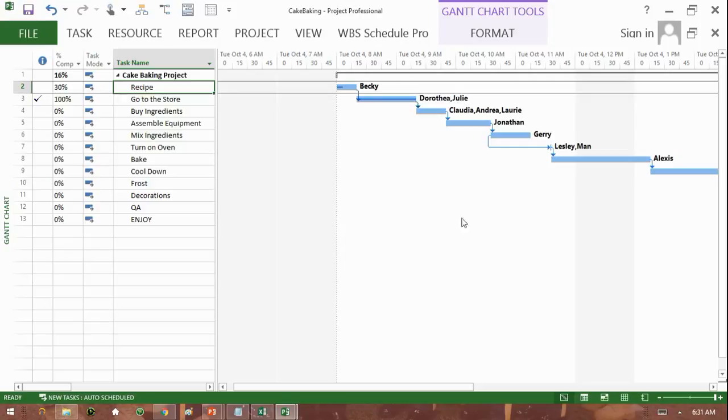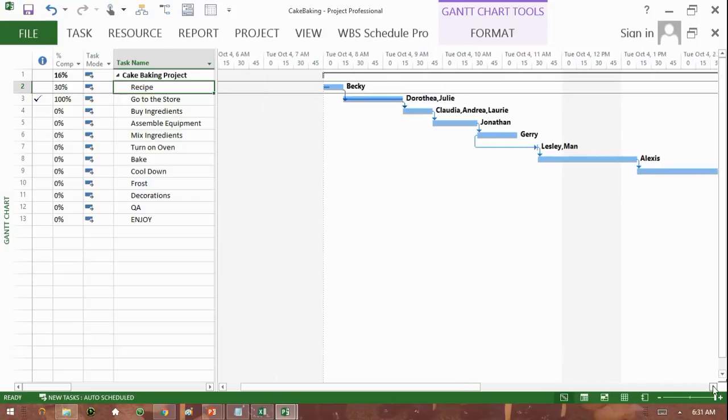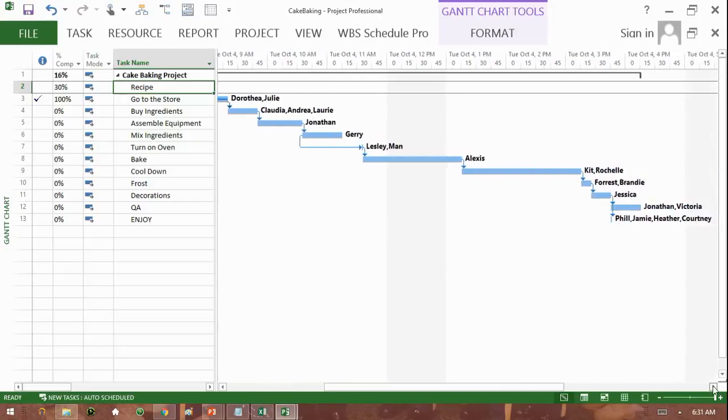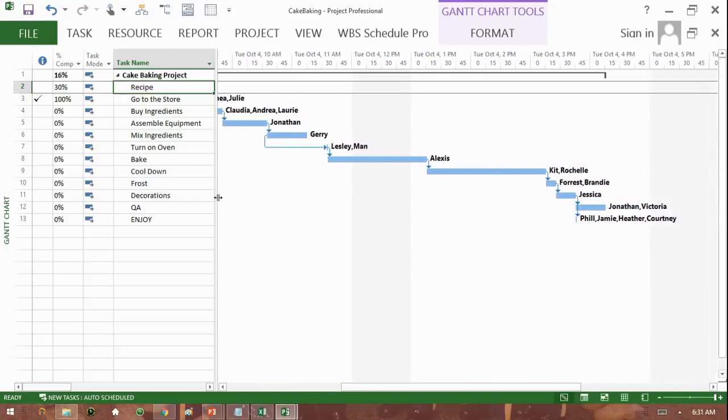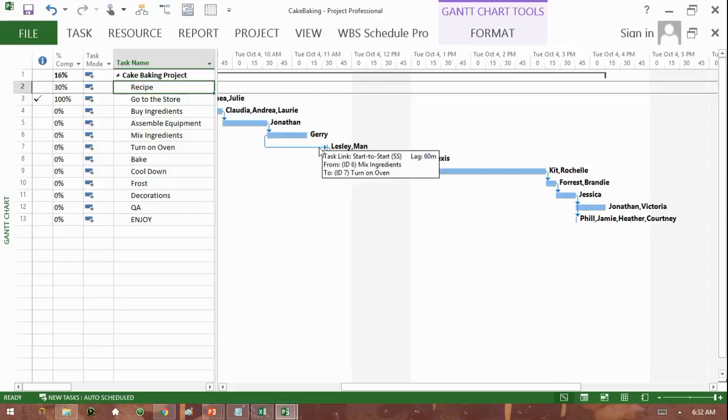We can also see an example of something called a start-to-start relationship. So in the case of this one that Jerry has been assigned to, mix ingredients, you can see mix ingredients starts, and also at the same time, turning on the oven can start. Well, we've put a 60-minute lag in between these two.